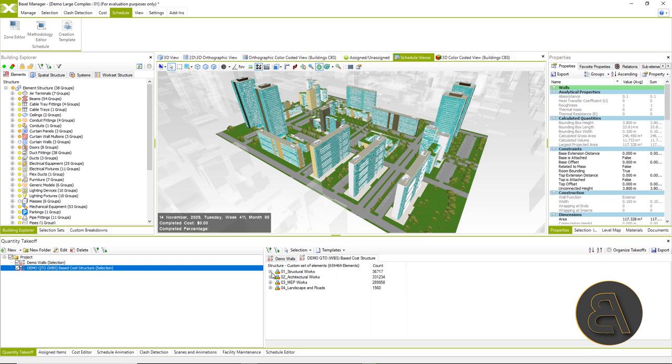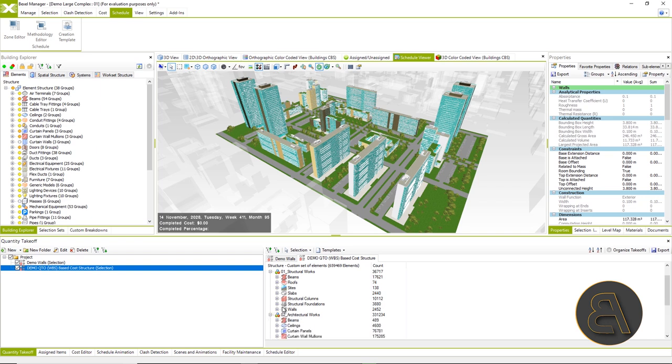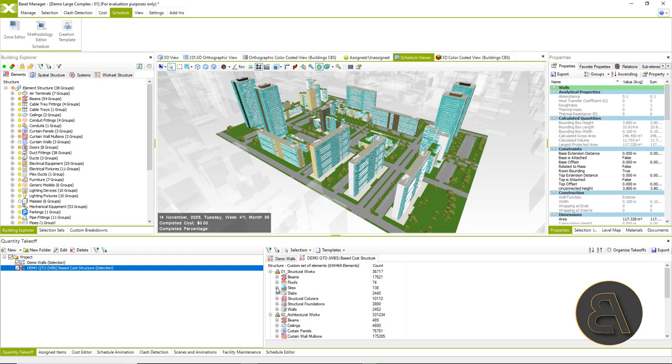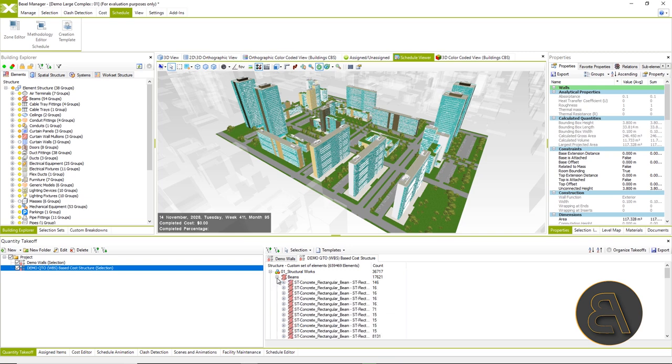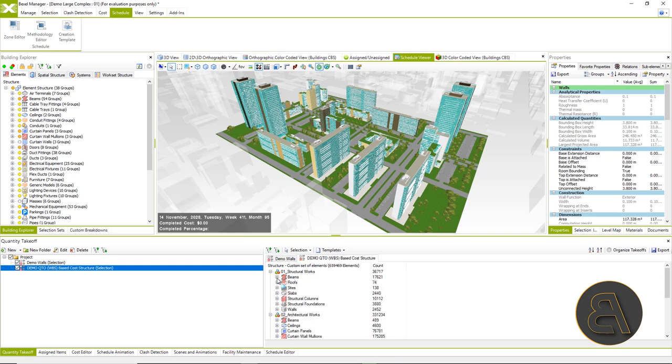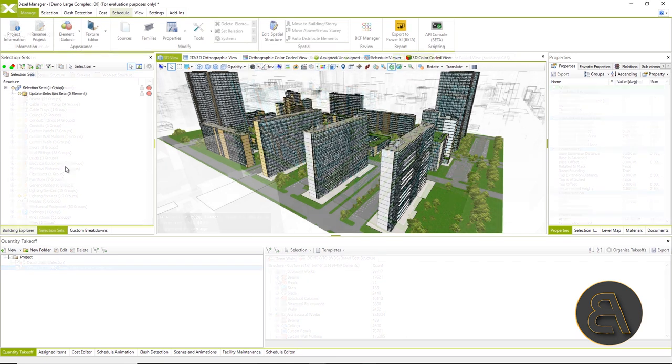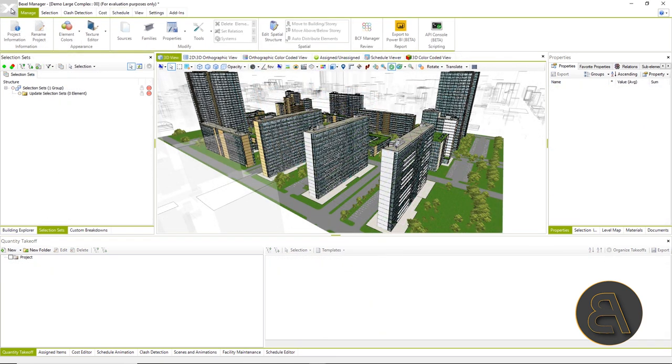Which means that the first step would be to create a work breakdown structure of the bill of quantities, QTO, based on the properties of elements and their quantities from which we will generate the cost classification.